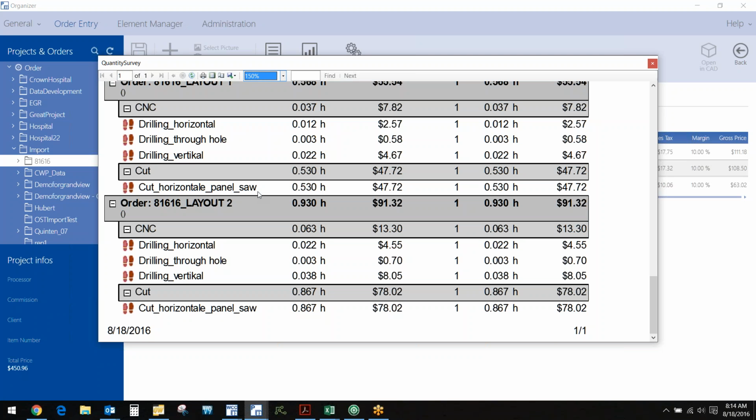So you would be able to report on exactly what it is that was done from the takeoff and estimation side compared to what happened from the engineered compared to the actual time on the floor. So now we can improve the way we estimate. We can be more efficient at doing things and have great ways to be able to compare, in the process of jobs, not just waiting for the end of a financial period where everything is lumped together. We could actually see it on an order-by-order basis.